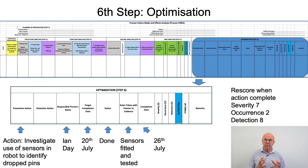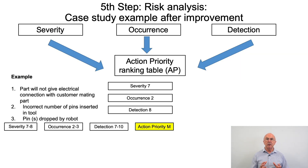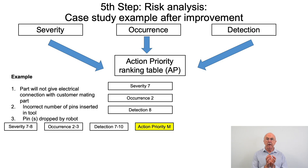The action was completed: sensors were fitted to the robot and comprehensively tested to make sure they worked, with testing completed on the 26th of July. After this action was implemented the team went back and re-scored. We haven't made any product design change, so severity remains at seven. We improved the prevention control so occurrence reduces to two. Detection remains at eight. Going back to action priority after the improvement, with severity between seven and eight, occurrence between two and three, and detection between seven and ten, we've reduced the action priority risk to medium.